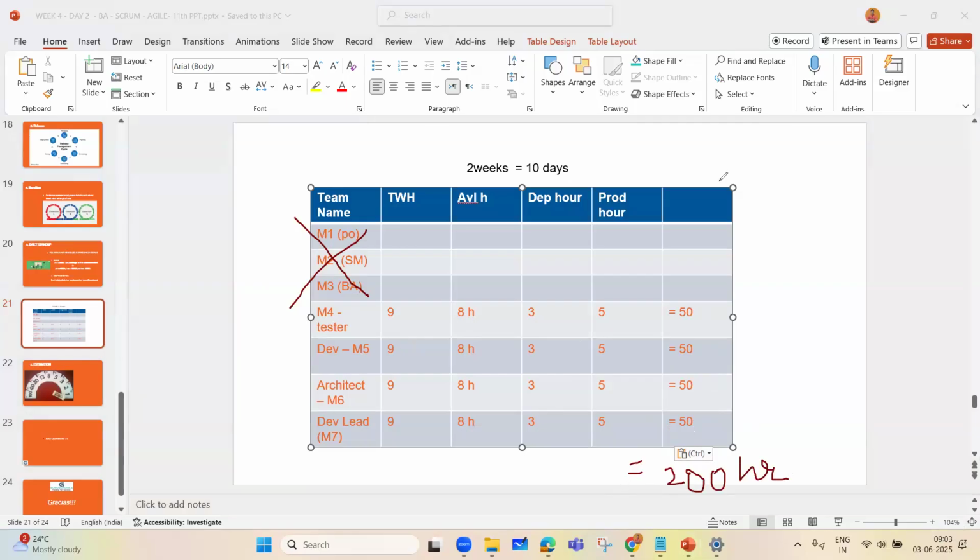Again, if this is going to be 200 hours, on the safer side you understand a focus factor. Most companies work on the focus factor, where they see how much the team can pay attention to without any blocker or deviation from their goal, and they consider it as 80%. When they consider 80%, it means that they add 20% buffer to the total capacity.